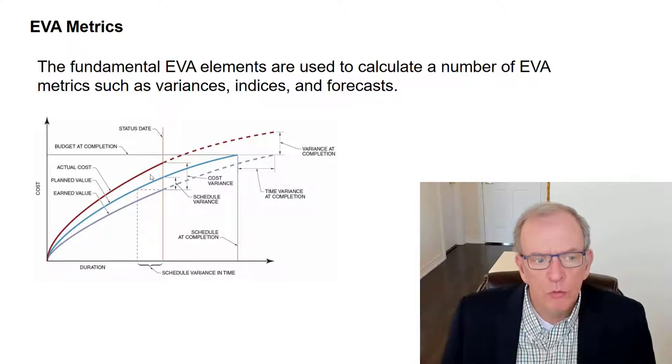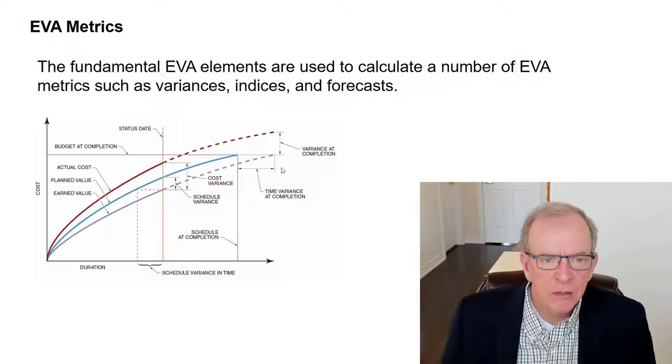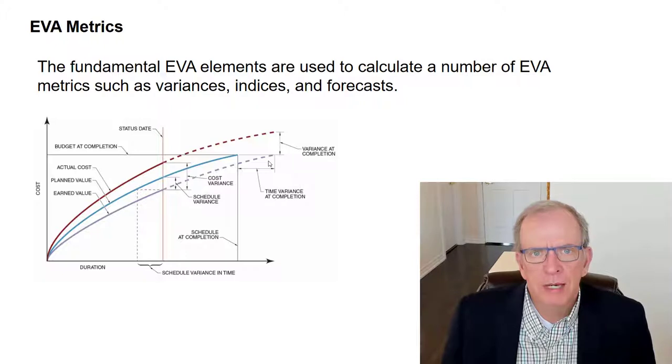And if we know those parameters, and we know in percentage terms what we have incurred, then there are calculations that can be done to say, well, if we continued along at this trend, by the end of the project we will be 3 months late and $2 million over budget. You can do those kinds of forecasts with earned value analysis. So you can see trends that are occurring, and a trend doesn't mean it has to happen. A trend will continue, using Stein's law, as we talked about earlier in the course, until it stops.